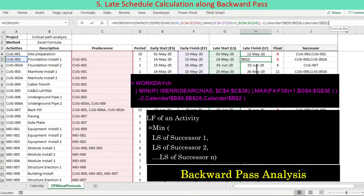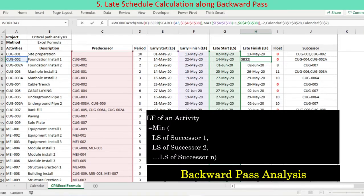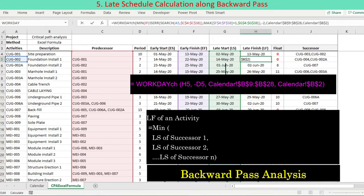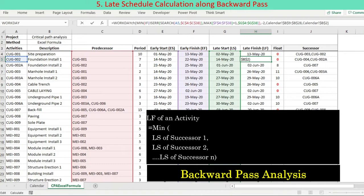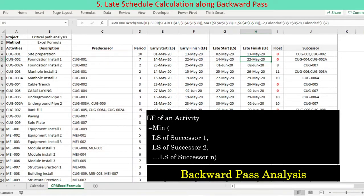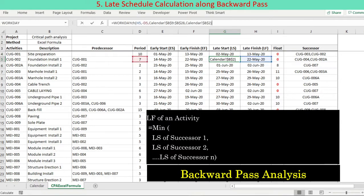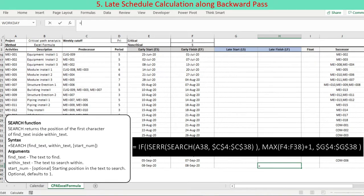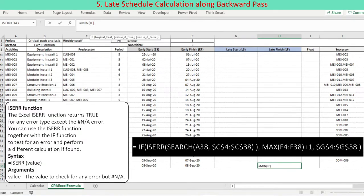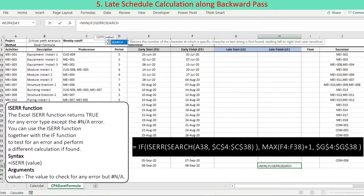Late schedule is calculated along the backward pass through the schedule, starting at the last activity. An activity must finish before its earliest successors start. The late finish of an activity is equal to the earliest start date of its successors — in other words, the finish date is the earliest, minimum, start date of its successors. The late finish date, abbreviated as LF, is translated into an Excel formula using the Excel MIN function: LF equals MIN of late start dates of successors. The Excel SEARCH function is used to find every successor of an activity. If no successor is found, an error occurs, which is the case for the project's last activity.